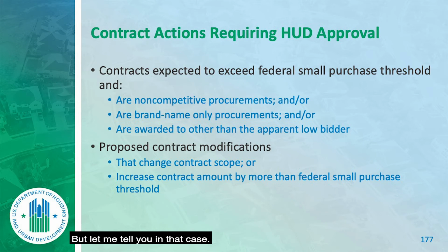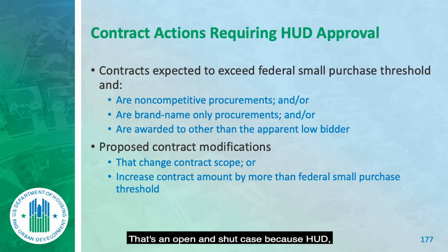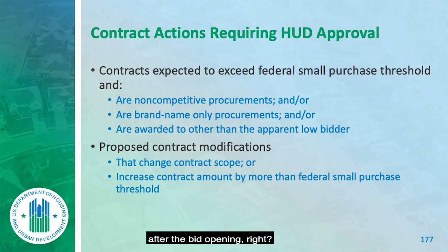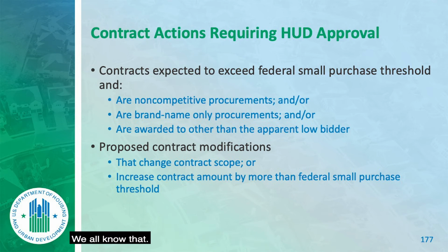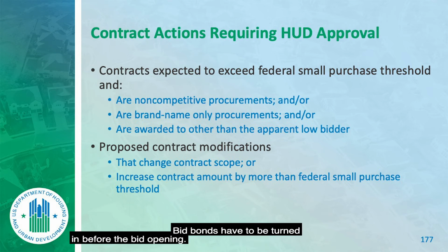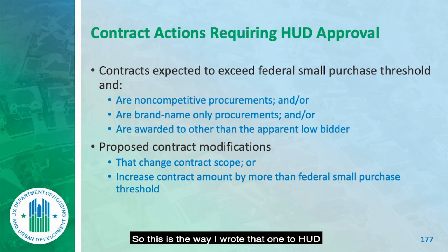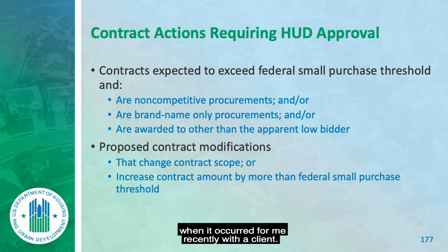But let me tell you, in that case, that's an open and shut case. Because HUD, you know that they can't go get the bid bond after the bid opening, right? We all know that. Bid bonds have to be turned in before the bid opening, right? Okay, so this is the way I wrote that one to HUD when it occurred for me recently with a client.